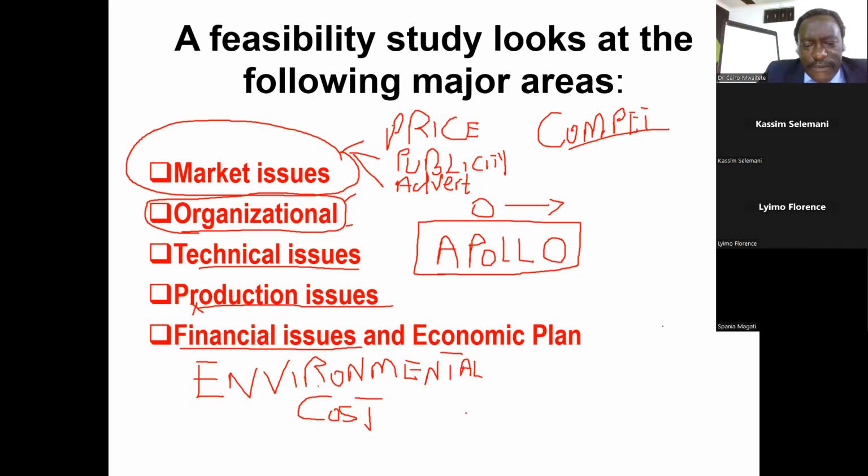So you'll need to identify cost at year 0. You need to identify cost at year 1, year 2, year 3. What are these? These are labor costs. These are materials. These are equipment. All these are supposed to be indicated there. You need also to look at revenue. This revenue must be estimated to justify the sustainability of the project itself. So you must sit down and develop this.